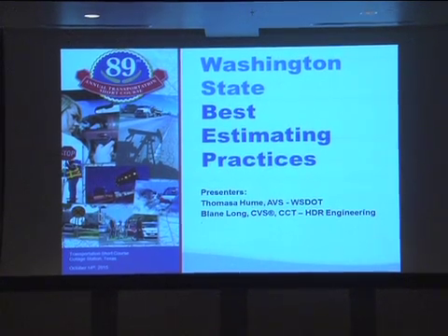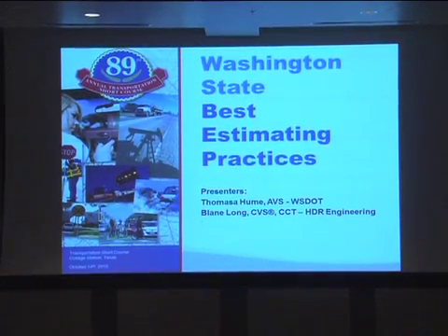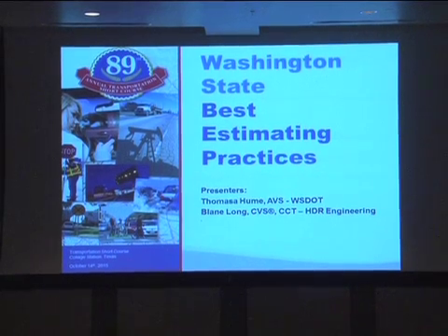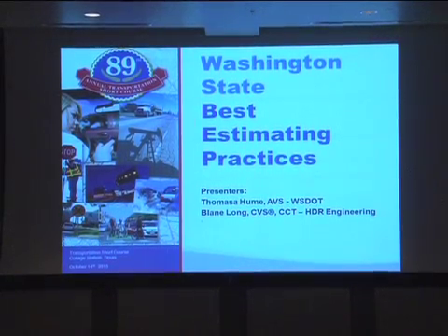And what we're going to present today is how to use a bid analysis tool to make the most of that bid history data that you have. What we can use this tool for is to efficiently sift through all this pile of data and get out those bits that are most relevant to the project we're trying to estimate at the time, like similar locations, similar quantities, similar types of projects.